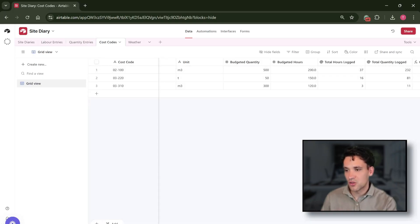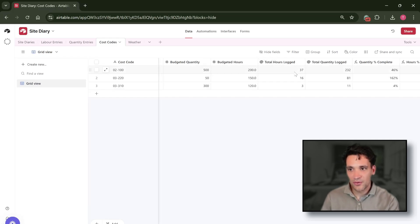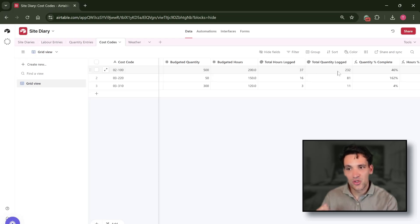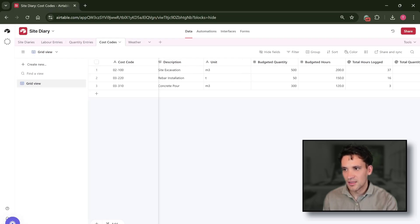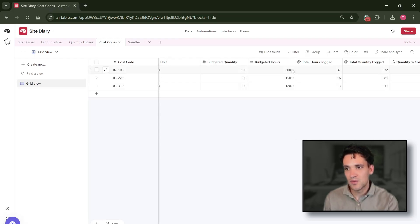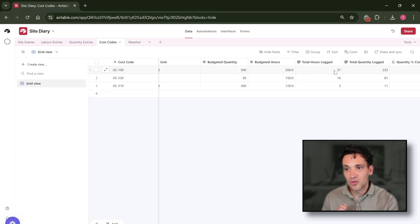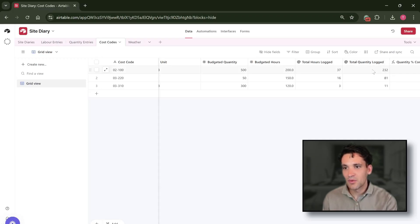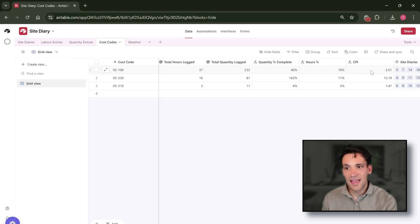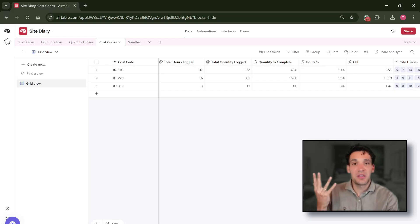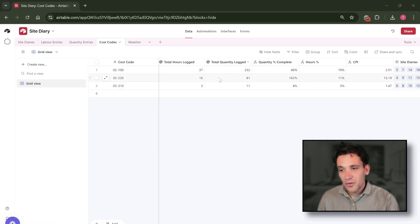Which then on our cost codes tab, so we've got three cost codes on this project: site excavation, reinforcement installation, and concrete placement. We can then use a roll-up field to sum the total hours worked and the total quantity logged. So for example, based on the diary entries we've got for site excavation, we had a budgeted quantity of 500 meters cubed, we had a budget of 200 hours, we've logged 37 hours so this is a roll-up field looking at all our individual labor entries, and we've logged 232 meters cubed. We can then calculate a percentage complete of our quantity, a percentage complete of our hours, and then a cost performance index based on that.